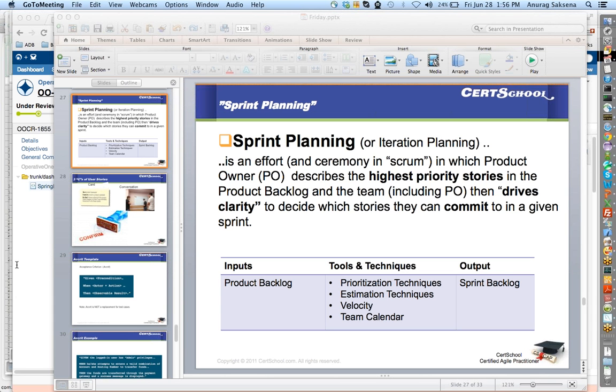Okay, so I see that there was a question from Sprint Planning. Scrum.org specifies sprints should be started back to back, and sprint planning should be included in the sprint, not outside the sprint. Yes, that is correct. At the same time, you can understand that Scrum is one of the agile methodologies. If you're using Scrum, yes, you want to do sprints back to back without any gaps in between. However, as we all know, Agile is a collection of practices and values.